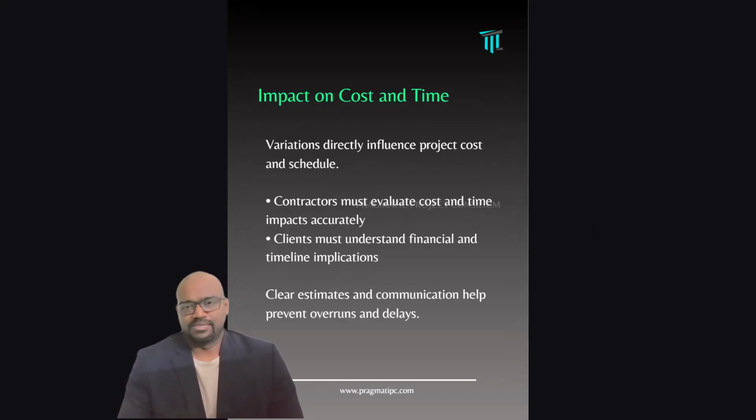I'll share another example, which I recently came across in one of my discussions in a WhatsApp group. There was an employer who said that the contractor has submitted the quotation for a variation claim. So that is a variation. We have agreed that technically it is a variation, and now we have to evaluate the cost. The contractor has brought 3 quotations, but all 3 quotations were very high. We asked for the breakup, and the contractor is not giving it.